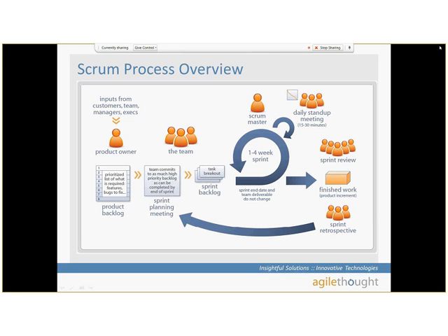And then if you look over here at the sprint backlog, that is where we are actually putting the user stories and committing to them as a team, and there's probably a lot more detail in there. That's where the acceptance criteria is going to be. I don't want to say finalized because we can always change it, but it's going to be pretty fleshed out in your sprint backlog. There are other things in here, but that's more about the Scrum process.